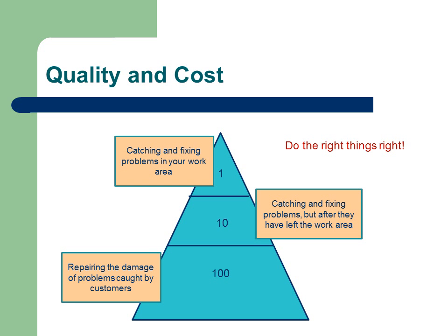Quality processes cost money, so there must always be a trade-off between the amount of money spent on quality assurance processes within a project versus the cost of rectifying errors at the quality control stage. The cost of rectifying errors gets higher as the project progresses, so a suitable amount of money should be allocated to optimizing the quality of the product as soon as possible.